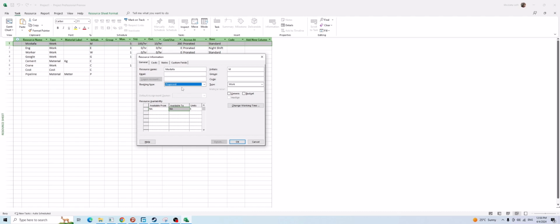But generally, it is not something that affects your normal calculations inside of Microsoft Project. But it can be helpful for reporting. For example, you have 10 different resources in your project, but you are not sure if you are allowed to use two of them. You still want to define them, plan for them, and try to get permission from management to use them. So maybe for reporting purposes, or to keep in mind that two of your resources are proposed and not committed yet, you can use this field.